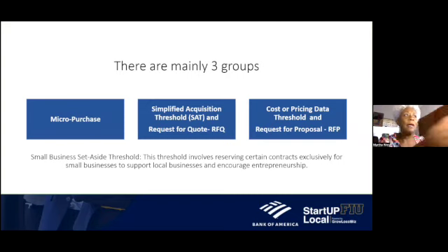So you have your request for proposal. I'm sorry, I'm going too fast. The request for quote, they basically have to do with the cost of that item. Your request for proposal, they want both cost and technical. So the difference between these 3: micro purchase, usually there's not many technical terms. They will tell you exactly what they want and you're gonna deliver. And usually they like to have more than 1 bid, but a minimum of 2, because the government has to write the justification that the best price prevailed.